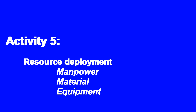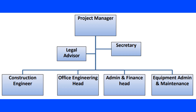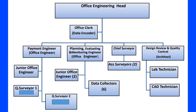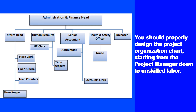Activity number five: resource deployment — manpower, material, and equipment. The first thing in this activity is manpower deployment. As a project manager, you need to prepare the project organizational structure based on the scope of the project and bid requirements regarding key personnel. This is the organization of people, their roles, processes, and reporting system — sometimes known as the line of command.